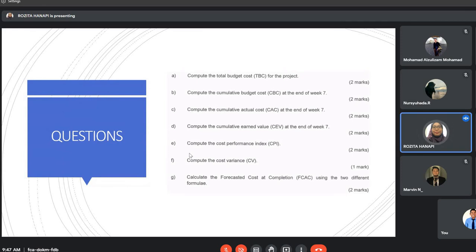So the answer for the first method is 905,000 divided by 0.90. The answer would be 1,005,555.